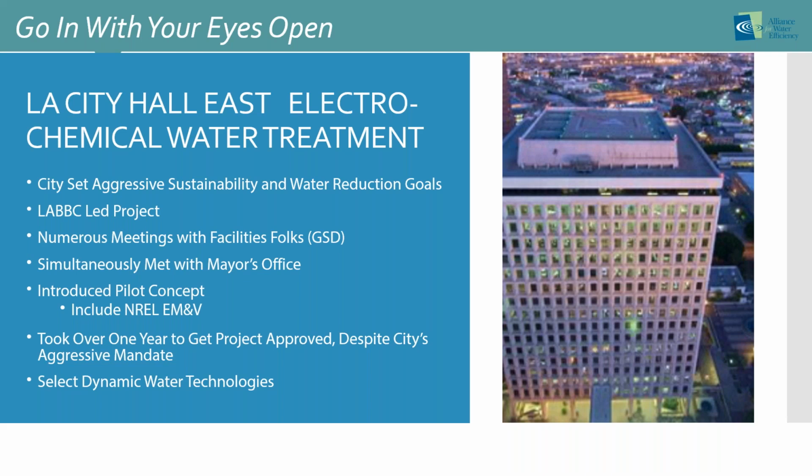Even with this city project, when they had already made a commitment to the water reduction goals, it still took us a year to actually get the project approved. We had to meet with numerous facility folks from their general services department, simultaneously with the mayor's office. What we decided to do was introduce a pilot concept so that it wouldn't be so overwhelming for some of the facility folks that maybe weren't ready for a new technology.